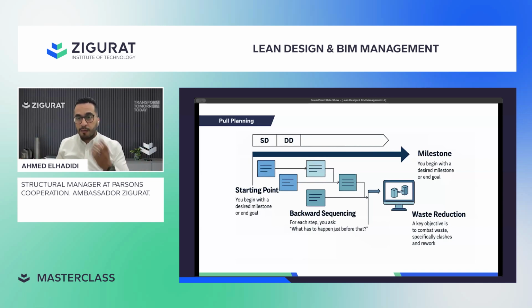Why would I spend time on the finishes before this? Because I have a contractor on site and I'm focusing on my client's requirements and benefits. This contractor will not wait on site without money. He will cost me money. He'll say, give me work, I'm waiting right now. So I will keep the designer working on the interior design, focusing on what we need, which is really important, but not at this stage. It's waste for me as a BIM design approach. So I need to focus on the architectural levels. What kind of levels do I have? Do I have 4 basements, 5 basements, 2 basements? Maybe I don't have any basement.